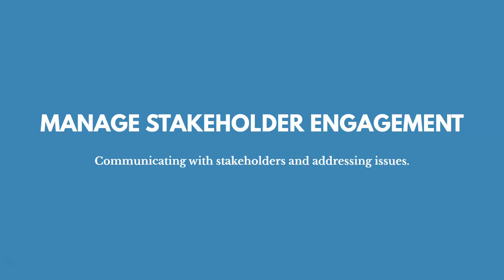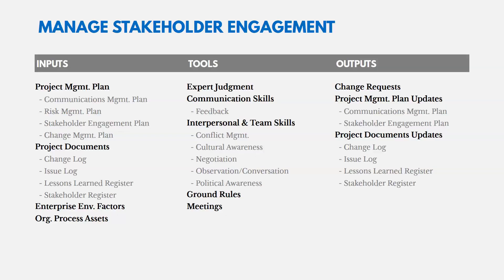Managing stakeholder engagement means communicating with stakeholders and addressing issues as they arise. Key inputs include the project management plan — most importantly the stakeholder engagement plan — along with project documents like the change log, issues log, and lessons learned register. For example, in the Dakota Access Pipeline project, when working with Native American Indian tribes to resolve protests and issues, you could pull up the issue log and discuss the specific concerns those tribes have.